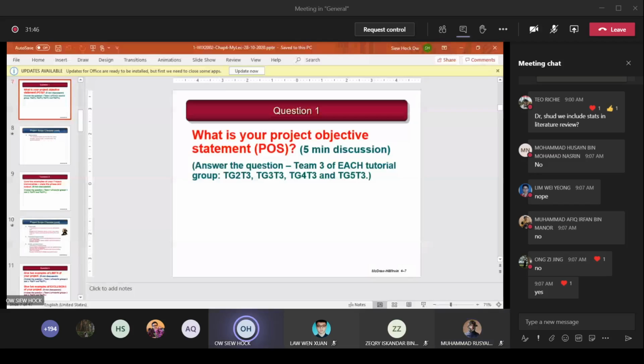No. So that means you didn't give me the when. The when has to be a date. No one knows what week 13 is. You have to give me a date. So let's say the Saturday of week 13 is 10 January 2021. You have to mention the date so people will know that is the ending date. But if you say week 13, I do not know when exactly you're going to finish your project. You understand? So you have to be very specific.